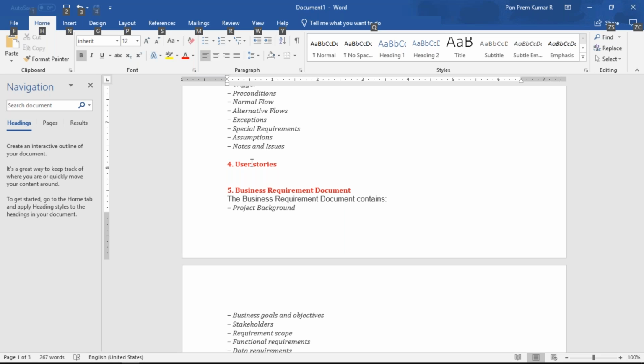For example, if the online form value is 5, another 2 more work items will be assigned to the BA and the development. The BA has to come up with user stories worth approximately 19 story points. This value varies according to the companies, the size of the team, and multiple parameters.